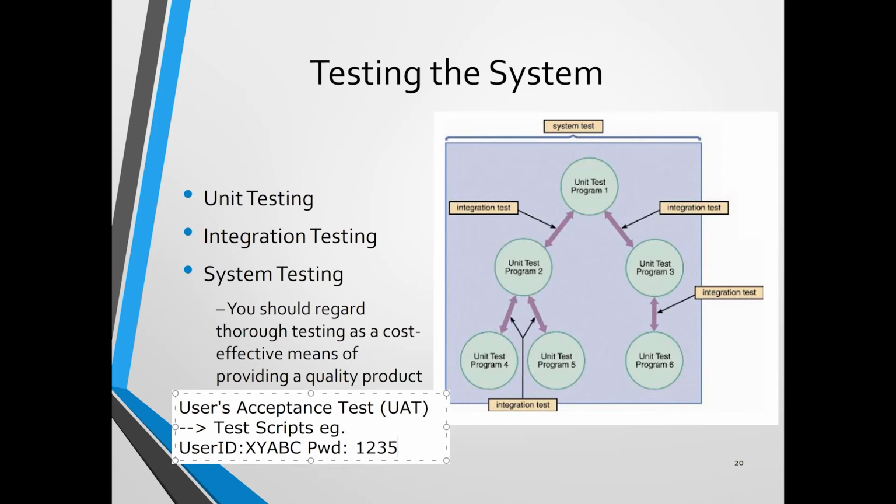So you may say that, when users type the user ID and password that you provide, what happened on the screen? The things that the user may have to do is that you may prepare a table and let the users type what's going on. For example, the user may type that it shows invalid password or user ID. Or you may say that you want the users to capture the screen and paste it into this script.